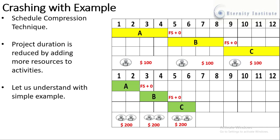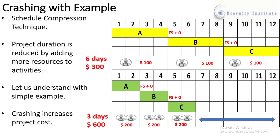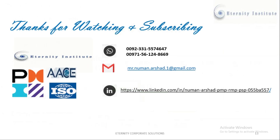Definitely, when we increase the number of resources, the cost also increases. We can conclude that crashing increases the project cost, but at the same time the duration decreases. In the normal scenario the project is completed in six days for $300, whereas with increased resources the project is completed in three days for $600. Thank you very much for watching and subscribing.